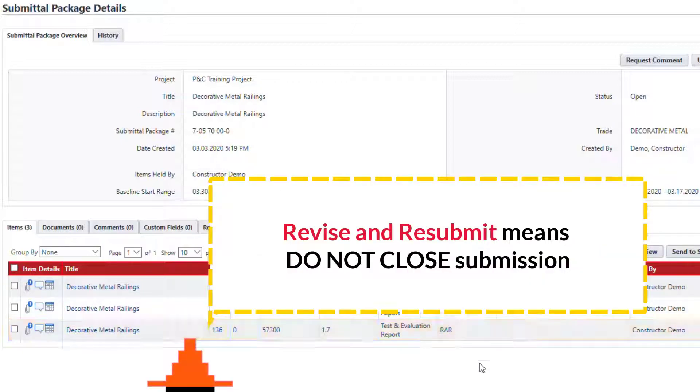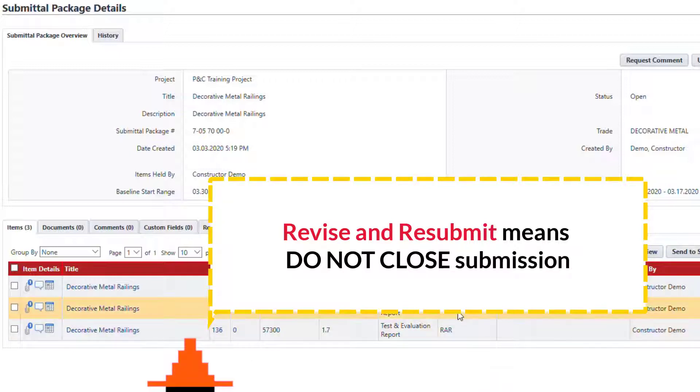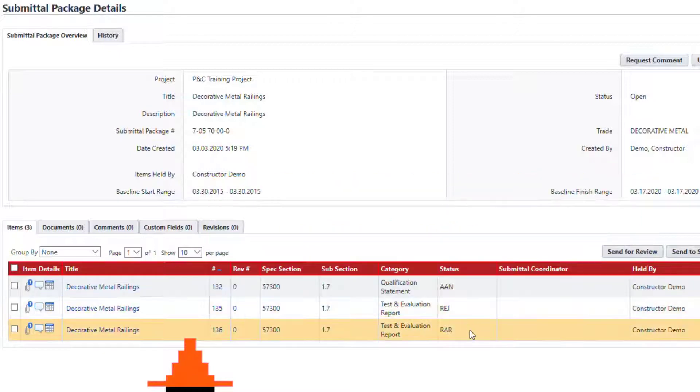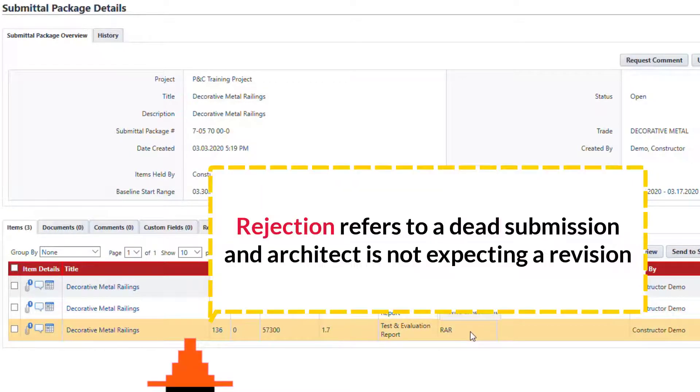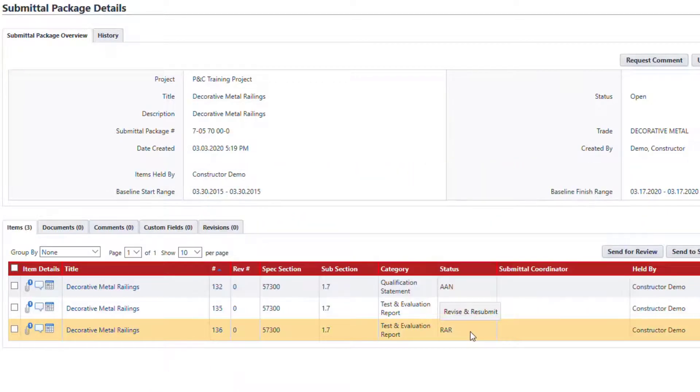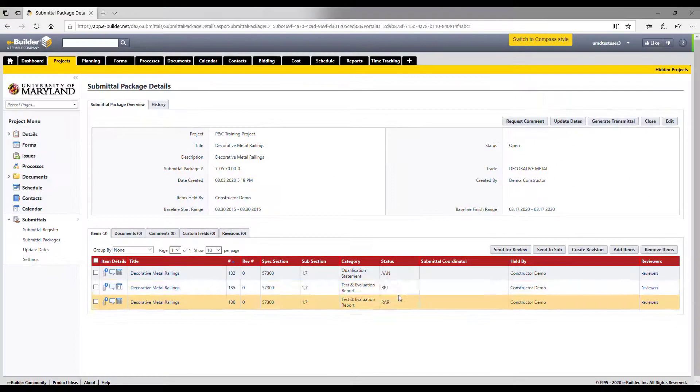Revise and resubmit means do not close the submission because the architect is expecting a new version regarding the submittal item. In contrast, rejected means it's a dead-end submission and the architect is not expecting any revision.